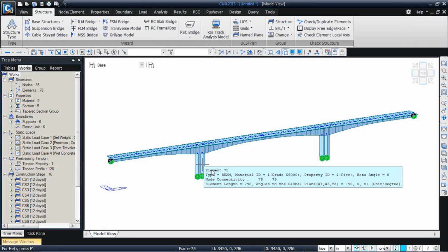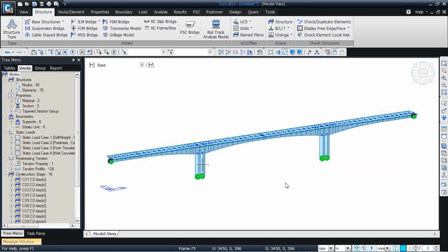Now construction methodology selection also depends a lot on the labor cost and the time invested, the nature of the site, and the usage of the under-bridge area. So depending upon those factors, the client usually recommends or puts forward a particular type of construction methodology, and unless there is some significant saving or another specific requirement, the construction methodology mainly remains more or less the same. So actually the engineers have to work within very tight brackets in order to come up with an optimal